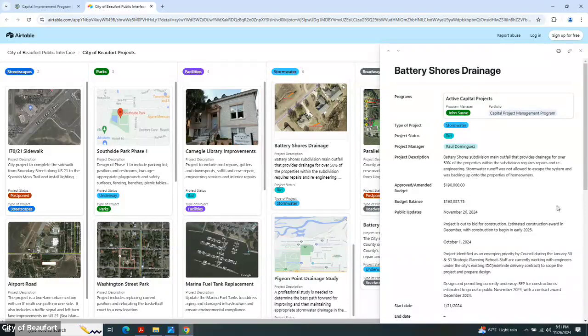that depending on how that catch basin, the lagoon, actually the retention pond sat within their guidelines, whether we had to go any further with permitting or not. But after 3 weeks of trying to get a decision, we finally got one. It does not. So that's been approved. And as a matter of fact, I think I just signed the permit the other day and sent it back. So we're good on that portion of the project.